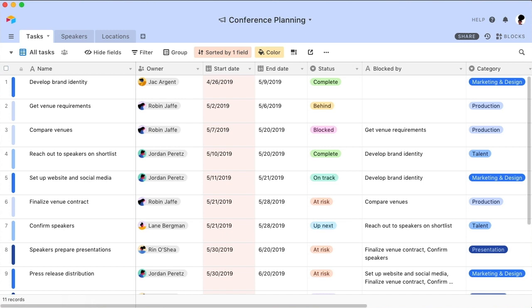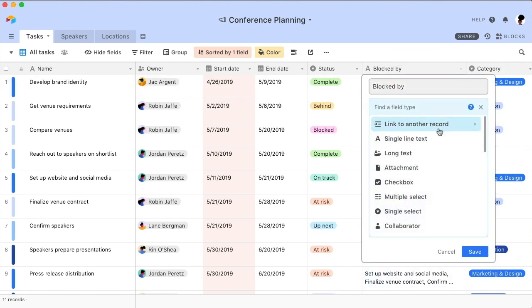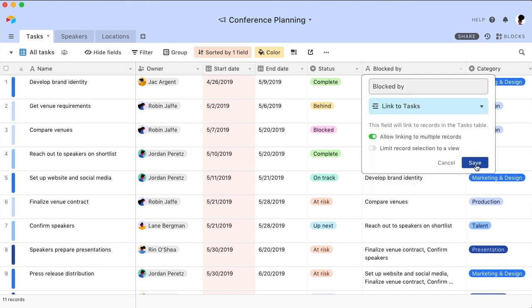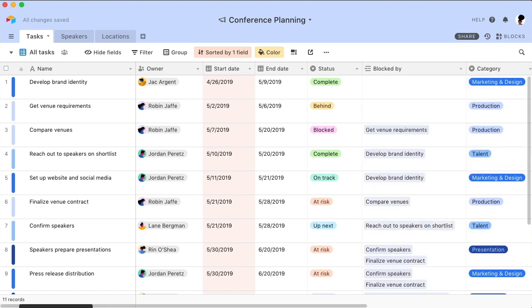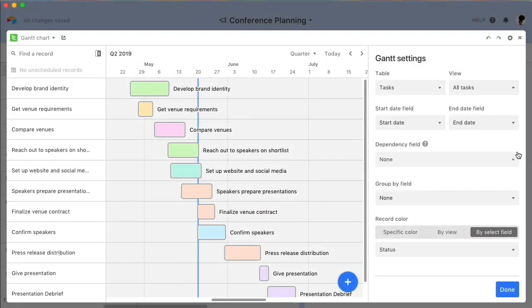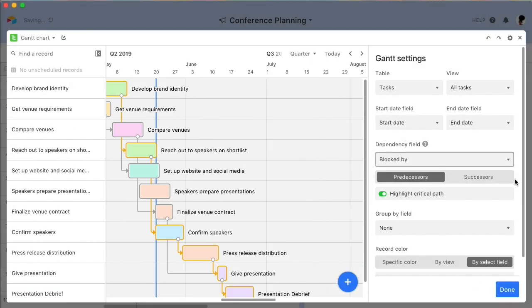If you already have a field with predecessors or successors, say because you imported an existing spreadsheet into Airtable, customize its field type to convert it to a self-linking linked record field. All of its existing information will then automatically be transformed into linked records. Now, select your new linked record field in the block settings panel, and your dependencies will instantly appear on your Gantt chart.